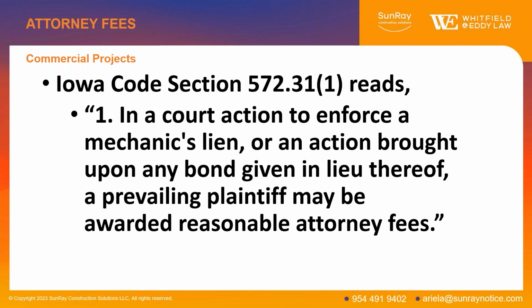So that's important. This applies to commercial projects, okay, and residential, so it applies to both. I noted commercial projects up here because there's another provision we're going to talk about that applies only to residential, but this does apply to residential in the sense that if you're a claimant on a residential project and you succeed on your lien claim, you can get fees.